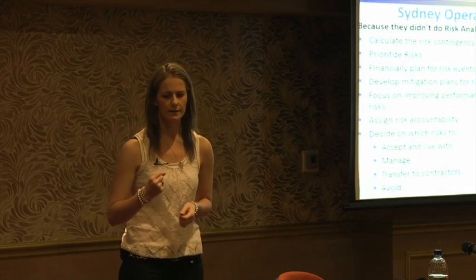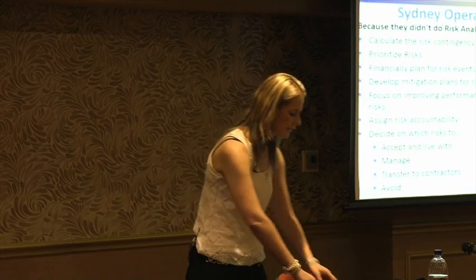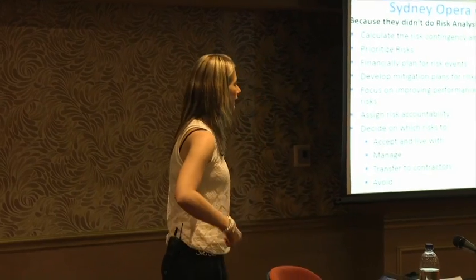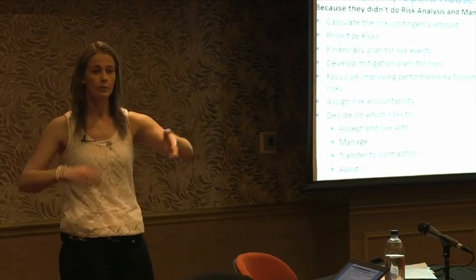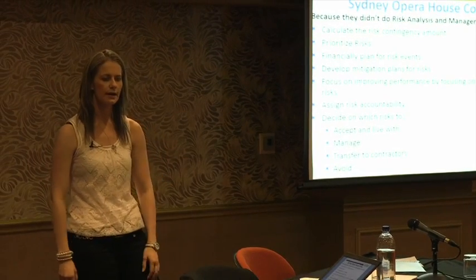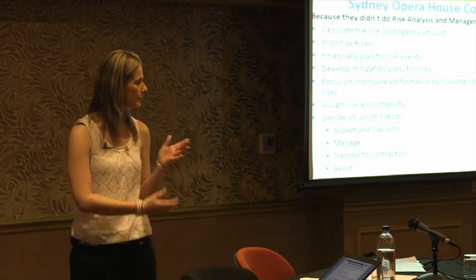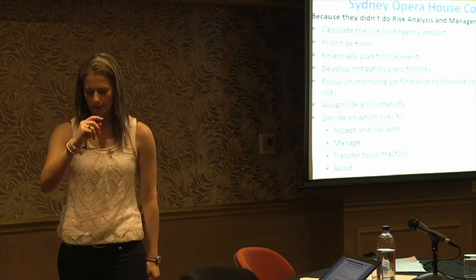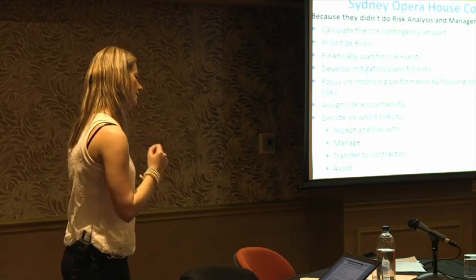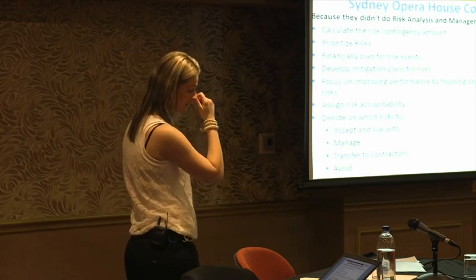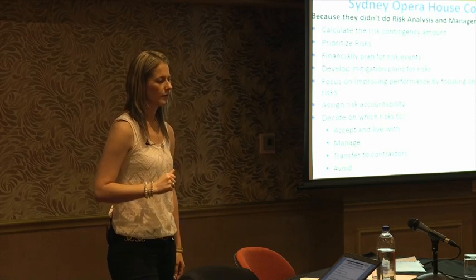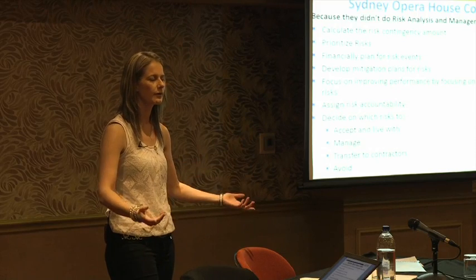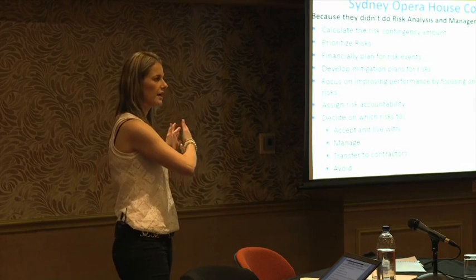So what risk accountability is all about, it's just saying that I know about this risk, and I'm the lead for procurement, for example, and I know we need to look at if inflation goes up, we'll buy bulk, so there's opportunity and cost saving. I know there's long lead items, we need to procure these things straight away. I know that fiber optic cable from electrical point of view, it gets damaged a lot, it's quite expensive, it takes some time to get here as well, so I need to order enough spare cable so I can have it in stock. So not when we run out, we go, oh, we've got to order. We need to have all those things in place.